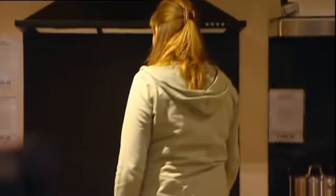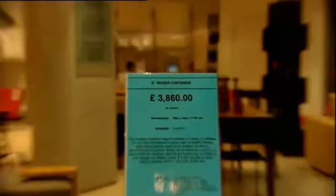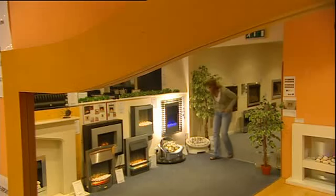When you're talking a designer kitchen, 3 top-end bathrooms and a house full of high-spec furnishings, it's not long before £40,000 has disappeared. And Rebecca's not even close to finishing. I'm quite excited because I've ordered a lovely fireplace, but I have gone way over budget. I'd only budgeted £600, and this has come up at virtually £2,000. So yes, I've gone over budget, but I think it was worth it. The house needed a fireplace such as this. It's got to be finished off properly, so I'm glad I've done it.